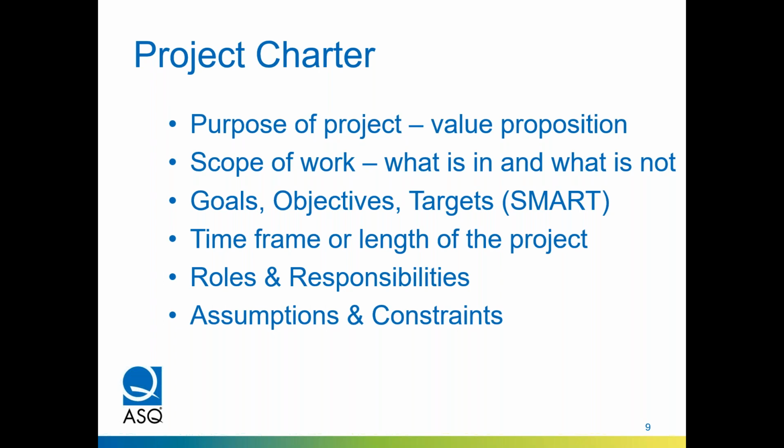Roles and responsibilities, it's important to know who's expected to do what and what roles various people have to play. And then assumptions and constraints. A lot of times these are not spelled out, but it's important so that you can make visible some of the things that people just assumed. So it's an opportunity to put in writing the various assumptions that people might have with regard to what's the intent of the project, what might be off limits, what might be available.